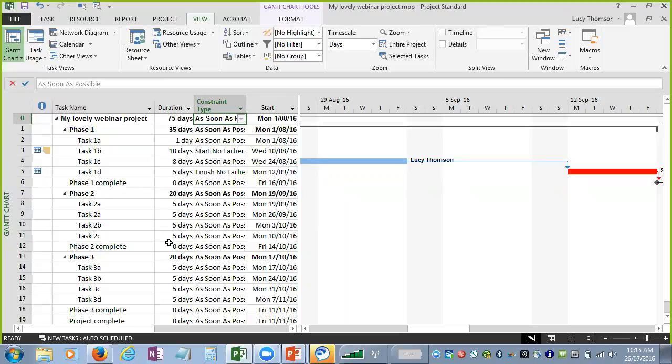Now there's a really big thing that we've not talked about, and that is how you update your schedule. Lots of people use the percentage complete method. Percentage complete is actually pretty meaningless. What does halfway through a task mean? Does that mean I'm halfway through the work? I'm halfway through the duration. If I've got a task that I said will take me 2 days worth of effort and I've given myself 2 weeks to do it, if I get to the end of week 1 and I've not started, am I halfway through the task or am I not?